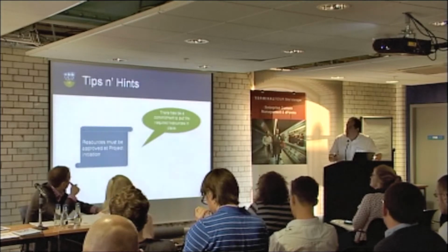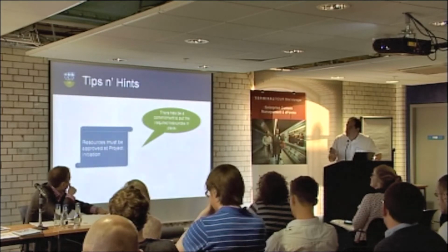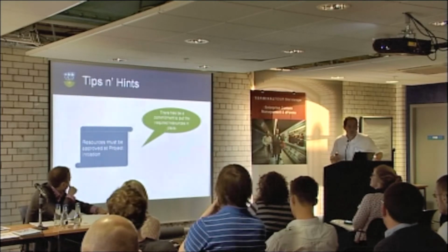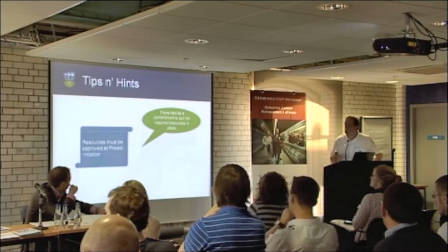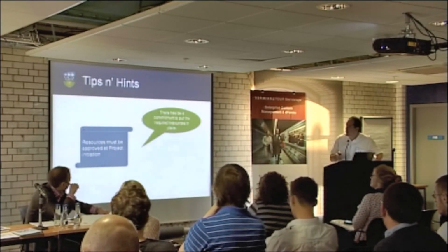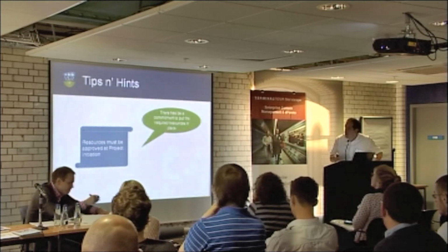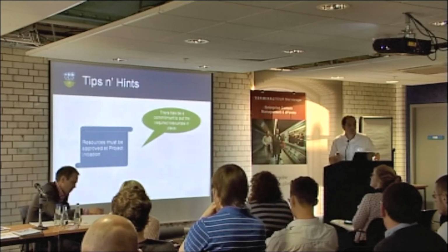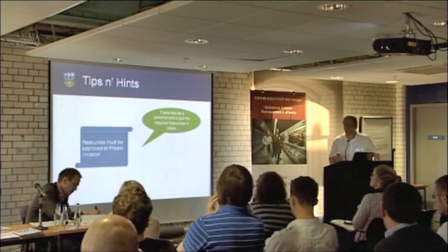so don't feel that it's been imposed on them. Resources must be approved: try and get the resources approved at the project initiation. These days it'll be very hard to get resources approved in any event, but it's going to be harder to get them approved later on, and it'll also be hard to roll out the system sometimes if you're using already busy resources to do that.